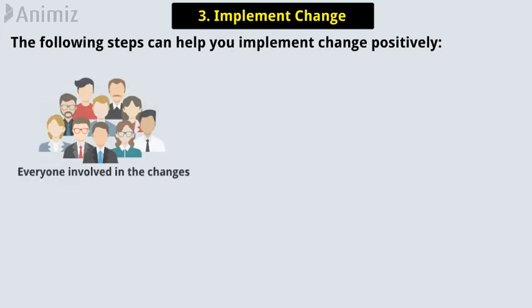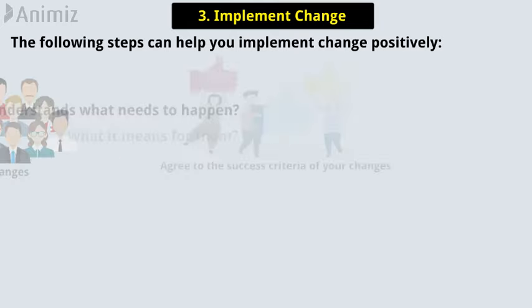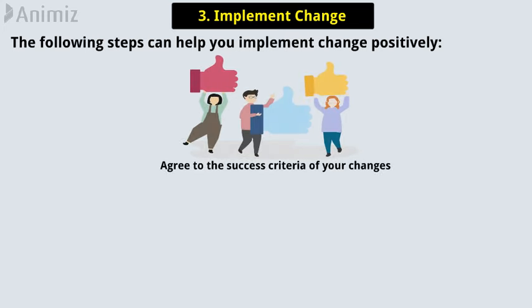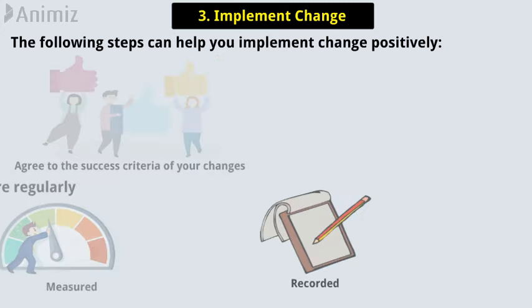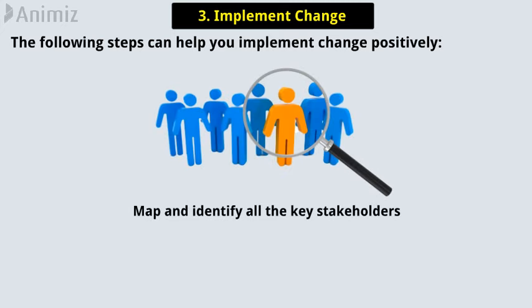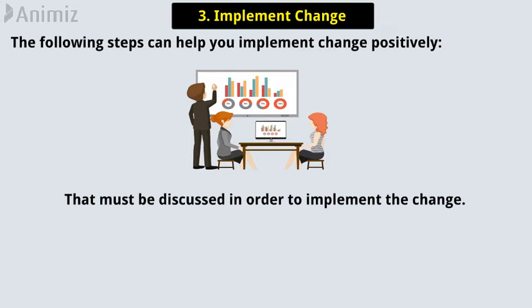The following steps can help you implement change positively. Ensure that everyone involved in the changes understands what needs to happen and what it means for them. Agree to the success criteria of your changes, and make sure that they're regularly measured and recorded. Map and identify all the key stakeholders that will be involved in the change. Identify any training needs that must be addressed in order to implement the change.